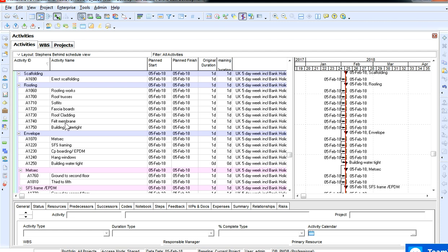You do all of those, and then if the roof has got a pitched roof, a flat roof, etc., and it requires any cladding, you'd clad that. But prior to the cladding of the roof, you would have fixed the roof trusses or roof framing, and then you fix the roof cladding.